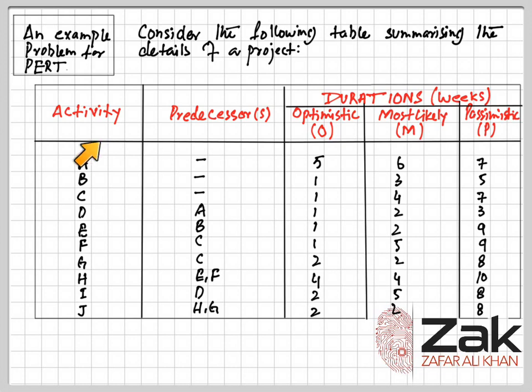And then we have activity, the actual performance of a task which consumes time and requires resources such as labor, materials, space, machinery. It can be understood as representing the time, effort, and resources required to move from one event to another event. A PERT activity cannot be performed until the predecessor event has occurred.